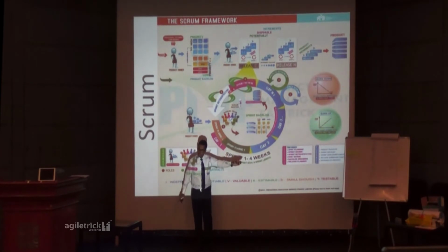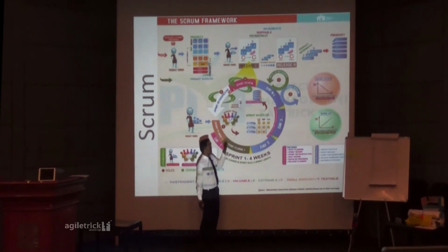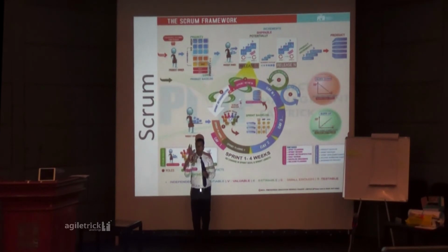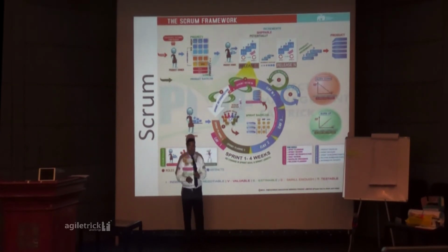But they have a capacity of 366 hours, so they go for the next story. They pull another story and again start breaking it into tasks. That is called work breakdown structure, WBS, right? They break the story into tasks and assign hours, how many hours it will take.